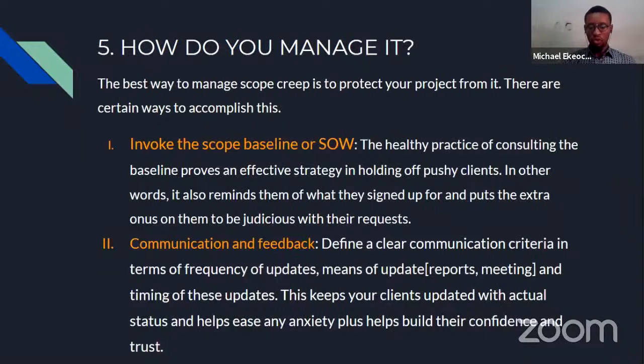So the next one there is communication and feedback. Like I said, communication is always important in whatever you're doing. And as a project manager, it should be one of your top priorities. So define a clear communication criteria in terms of frequency of updates, means of updates, could be reports or meetings, and timing of these updates. This keeps your clients updated with actual status and helps ease any anxiety, plus helps build their confidence and trust.